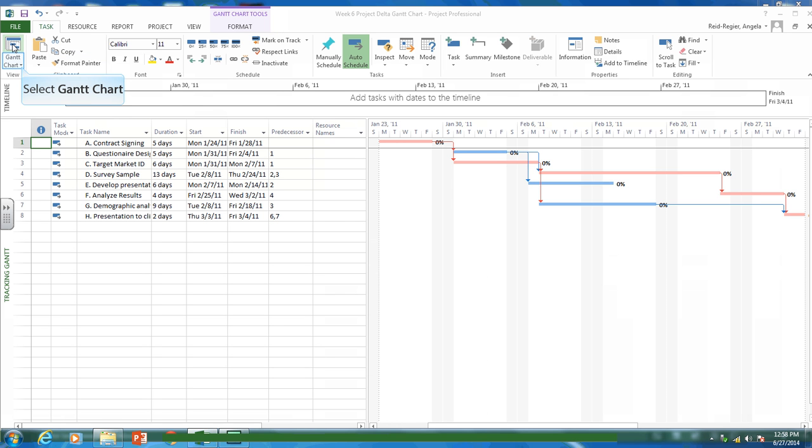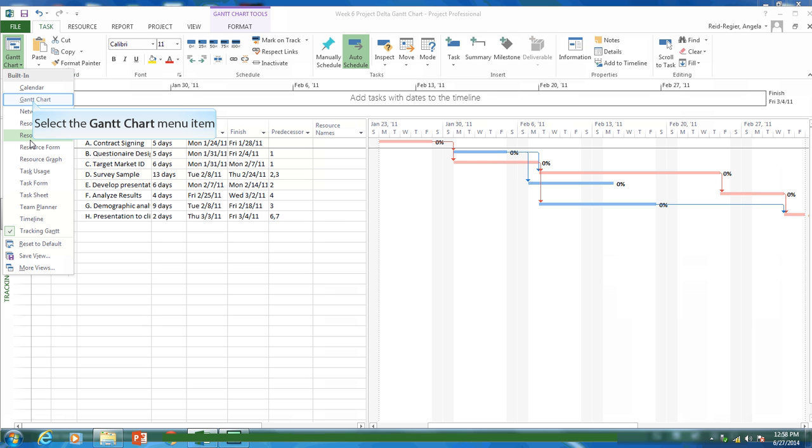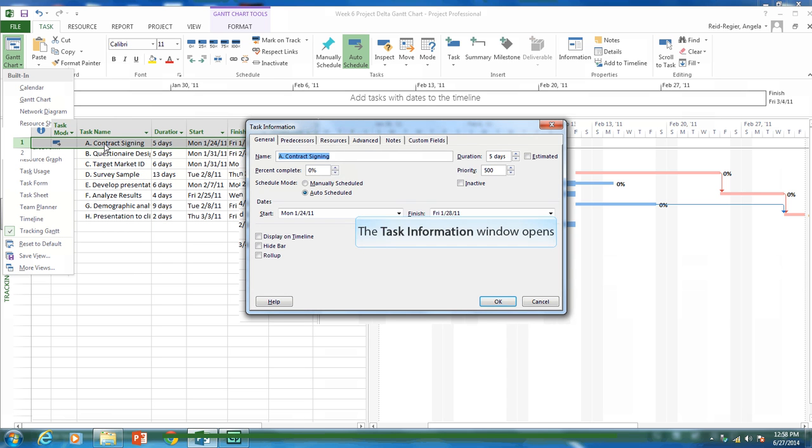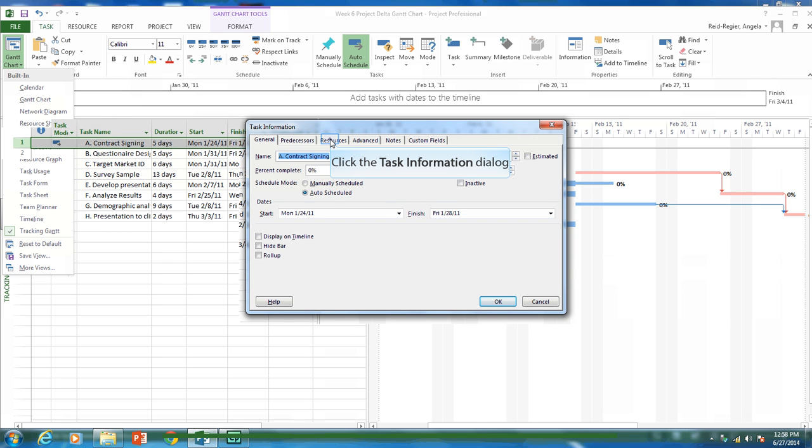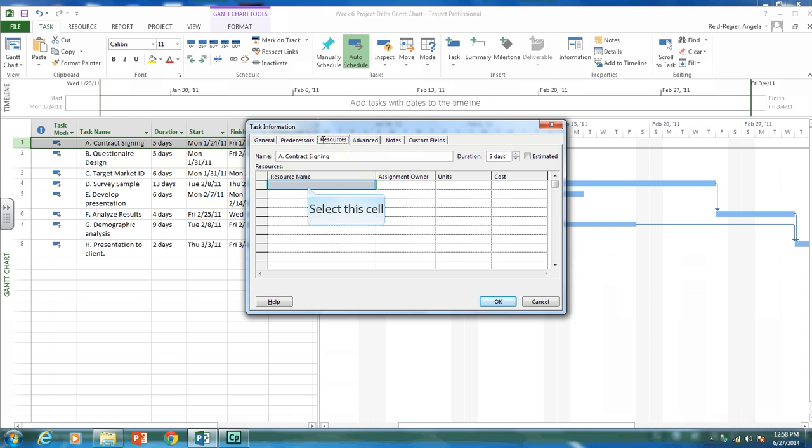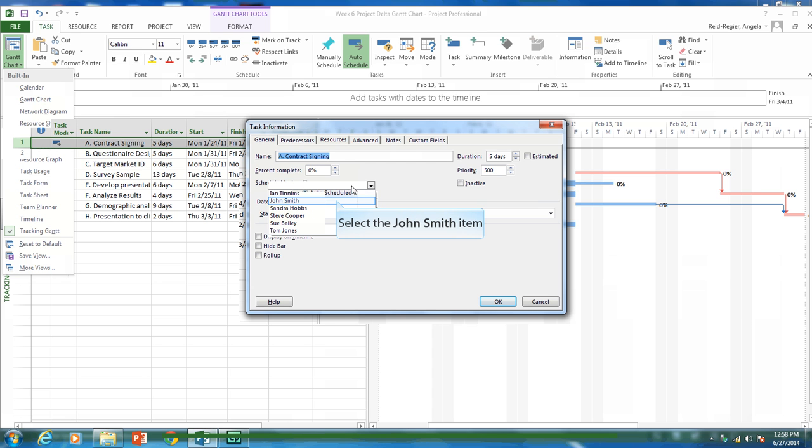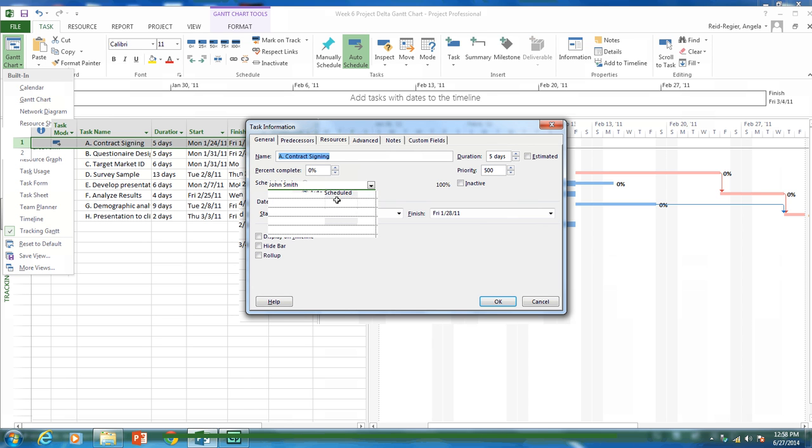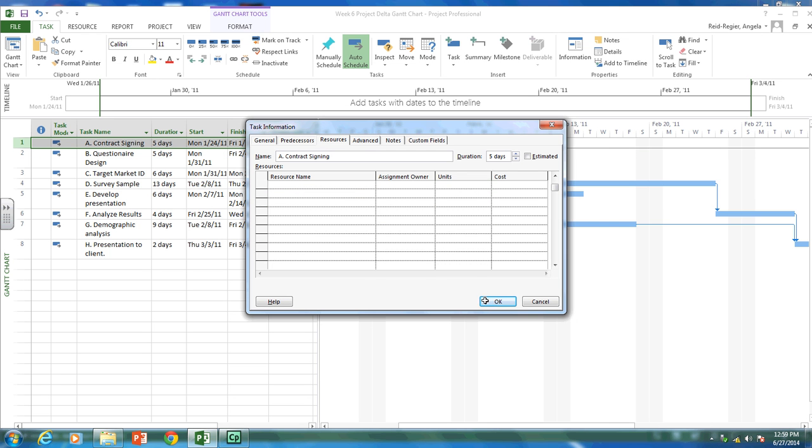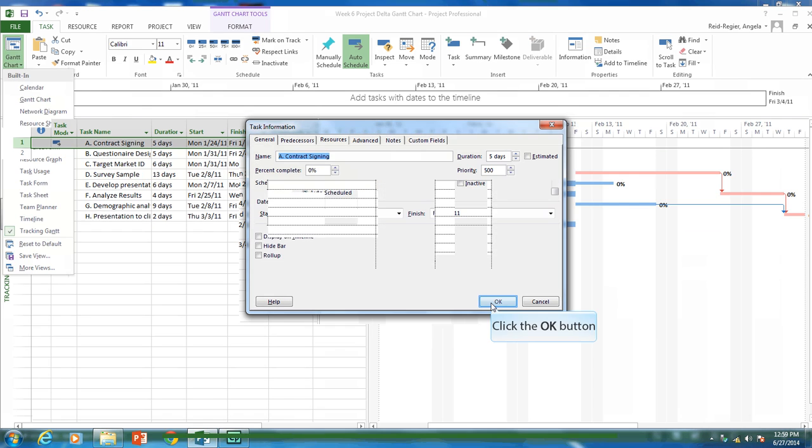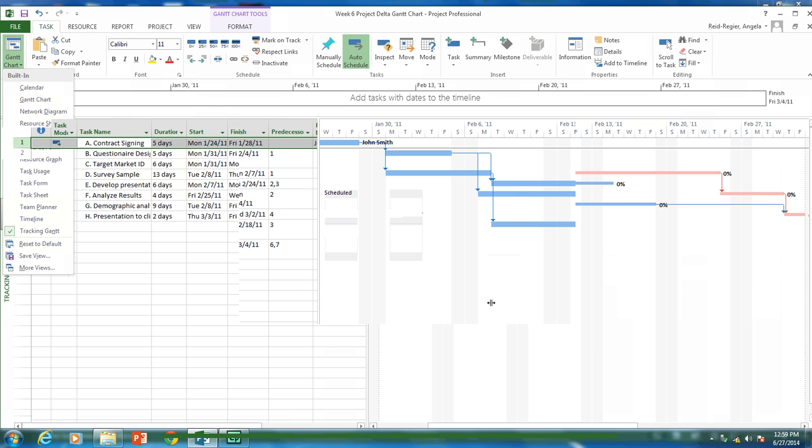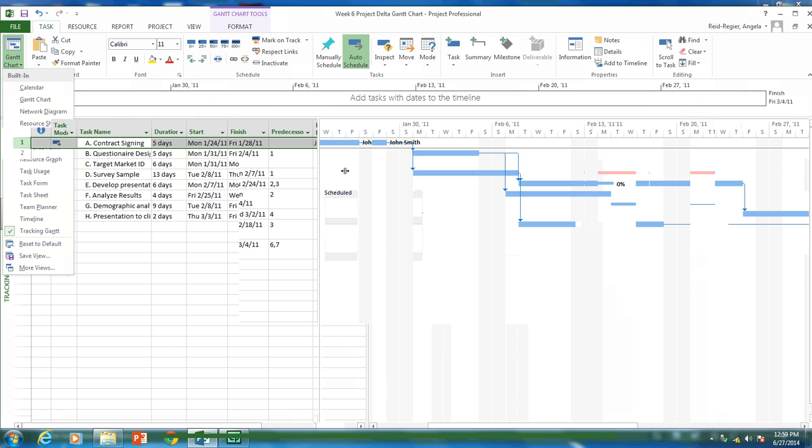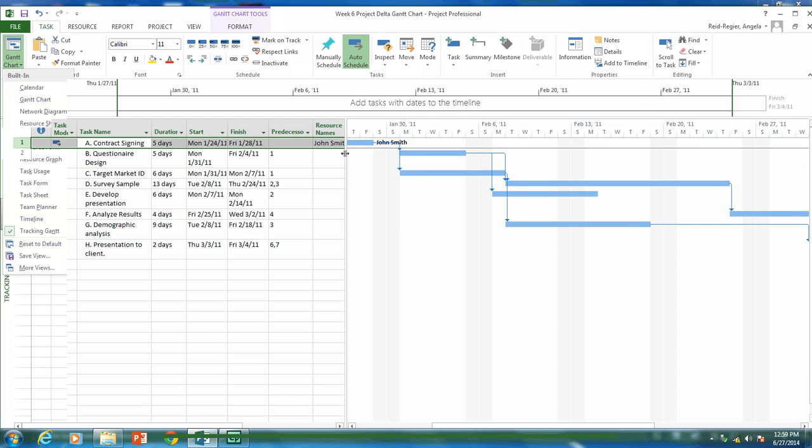Let's go back to our Gantt chart view. And let's assign those resources. Now I want to be in the regular Gantt chart view. So take it out of the tracking Gantt chart view and put it in the Gantt chart view. And let's assign these resources. So I'm going to double click on contract signing. And I'm going to go to the resource tab. And I'm going to assign John Smith to this task. And 100% means he's working full time, the full five days, eight hours a day. So in selecting that, you can now see John Smith has been assigned to this task. And if we open this up, you can see resource names, John Smith's name is assigned to that.